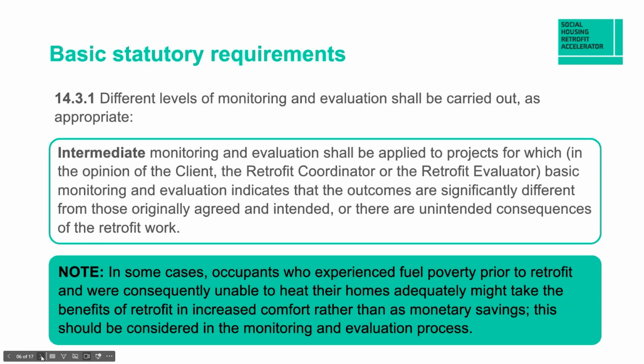When you go on to things like whether insulation is working, you might want to take a different approach. But I think it's worth considering that the more complicated your retrofit project becomes, so the more it moves towards a whole house retrofit, or it's a hard to treat property, so it might have a traditional construction approach, the more you're going to have an intermediate or above type monitoring regime. And as I said, if things don't go according to plan, then you need to understand why things are going wrong, and then you'll have to have another monitoring regime put in place.